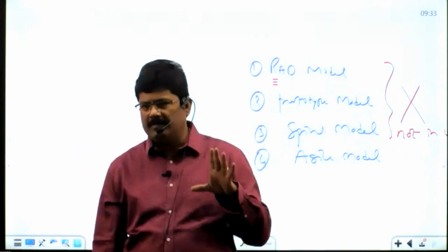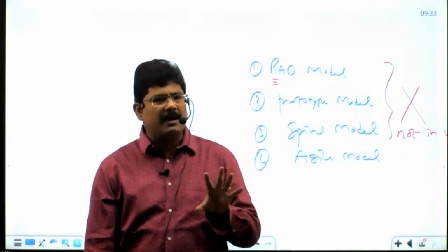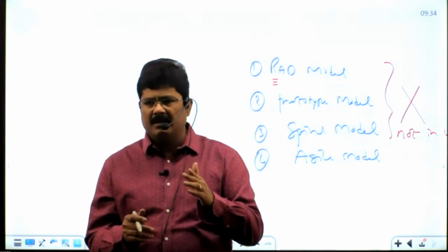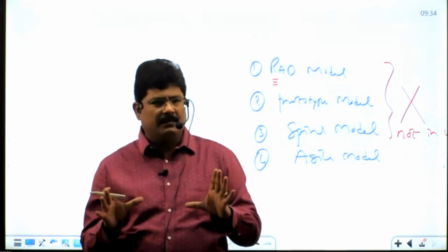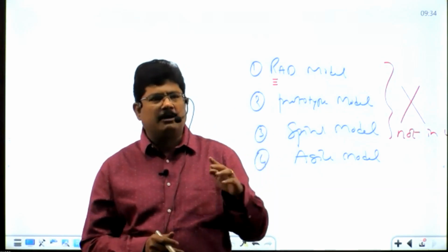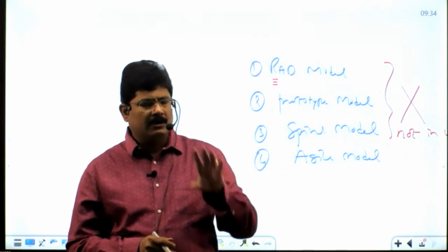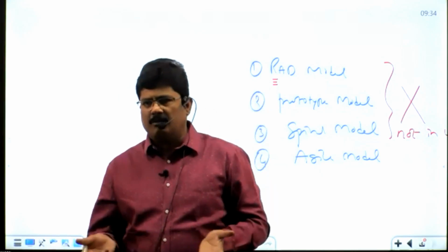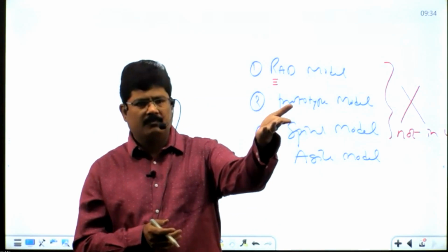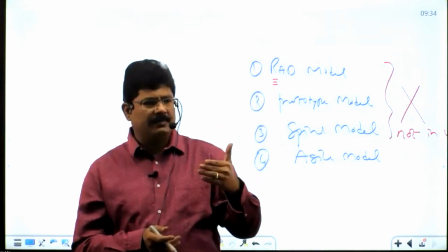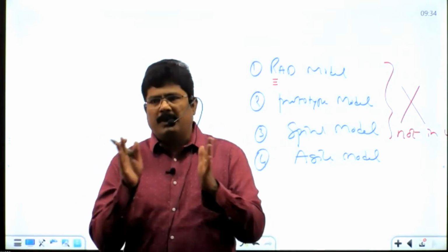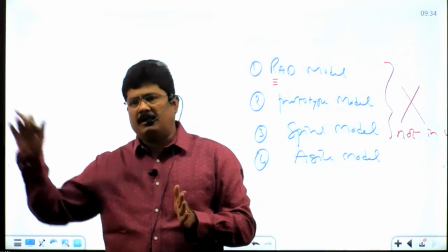What is the meaning of prototype? A simulation, a dummy. It can be a PowerPoint presentation. First, make a dummy based on the requirements. Make a dummy simulation. Go back to the client and explain, this is what we are trying to build for your business. Demonstrate the prototype to the customer, not the original. The original was not made. A dummy, a sample is made and demonstrated to the client. Get the approval from the client. The customer says, yes, I wanted my application like this. Based on the prototype, the remaining development activities will go.